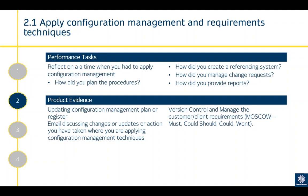There would also be configuration control, customer/client requirements, and MoSCoW — that's Must, Could, Should, Won't — which can be part of your requirements management. Requirements management techniques involve working out what is actually required as output, and from that you can then work out the components.